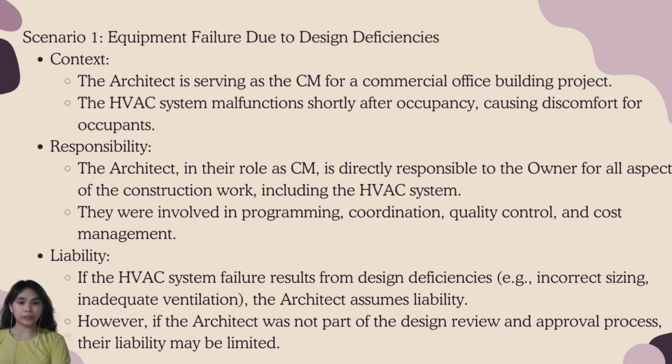So here is an example in scenario 1 where equipment failure due to design deficiencies. The context where the architect is serving as the CM for a commercial office building project. The HVAC system malfunctioned shortly after occupancy, causing discomfort for the occupants. So the architect, in their role as CM, is directly responsible to the owner for all aspects of the construction work, including the HVAC system. They were involved in programming, coordination, quality control, and cost management. The liability, if the HVAC system failure results from design deficiencies, for example incorrect sizing or inadequate ventilation, the architect assumes liability. However, if the architect was not part of the design review and approval process, their liability may be limited.